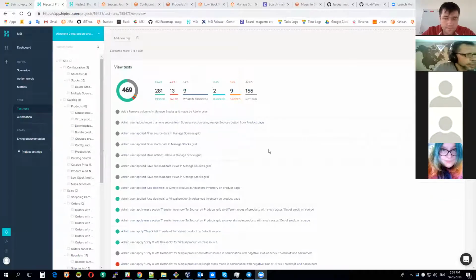Hello everyone. Probably I will share my screen. Here is our HIP test MSI project, and as you may see, we have a test run called Milestone 2 Regression Cycle. At the moment, we have 469 test scenarios, we covered, I think, 2/3 of it, and we have 281 scenarios passed, 13 failed, 9 still in progress, 2 blocked by a Magento bug, and 9 skipped because we have some scenarios dedicated to the behavior of bundle product on test source, which is not implemented yet. It's going to be fixed, so to say, in milestone 3.